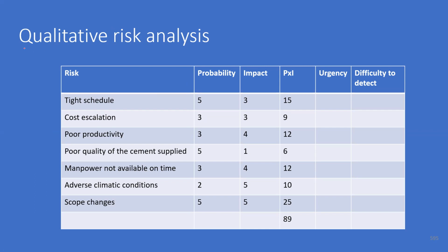Qualitative risk analysis, we already discussed it. By monitoring or reassessing the probabilities and impacts periodically, that will help us, because this P into I rating will change during the execution of the project and based on the effectiveness of the risk response actions.